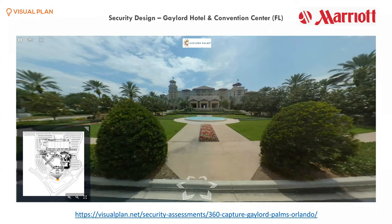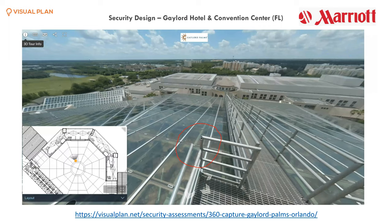One of our first big projects was with the Gaylord Hotel and Convention Center in Florida, just outside of Walt Disney World — a 65-acre piece of land with millions of square feet of hotel space, restaurants, and exhibit centers. We had a team of five people go out and scan everything right down to the washrooms. The value proposition was massive: we had full visualization to see things like broken pipes or safety risks, even on the rooftop of the atrium.